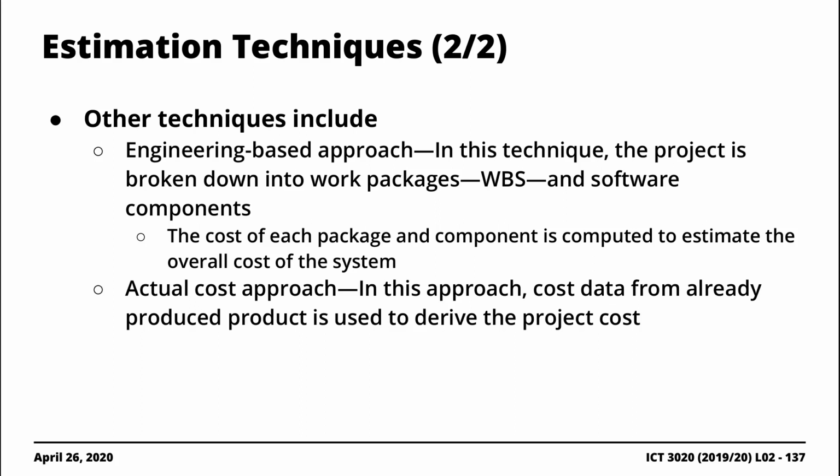You do the same thing for the schedule, right? You break down the project into smaller manageable components, and then you derive timelines associated with those different packages and components. A combination of those different approximations will give you a relative estimate of how long the project is going to take.